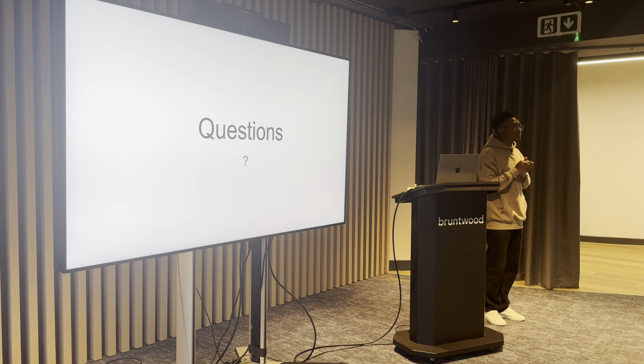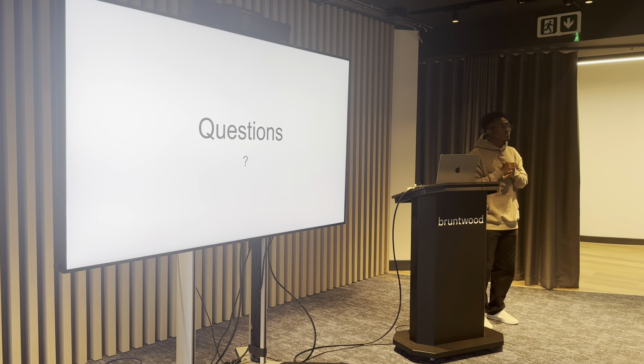Yeah, I wanted to just add more to what you said. So we currently use this in our office, right? And what we do most of the time is when we are doing sprint planning, like the three amigos just come together, we talk about what the future is going to be, we talk about the requirements, scenarios, and things like that. And while having that conversation, we are then writing the given, when, then.